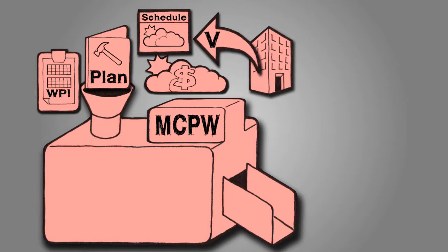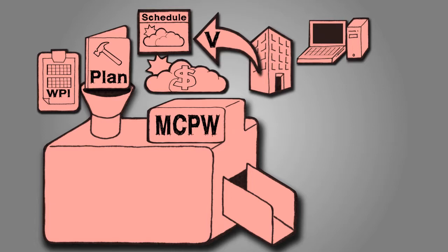Enterprise environmental factors and organizational process assets are things like federal regulations and quality standards that are all external factors that can have a significant impact on the monitoring and controlling processes. If during the execution of a construction project, the Environmental Protection Agency creates a regulation that designates the land being used as an environmentally sensitive area, this enterprise environmental factor can have a huge impact on the scope and even the viability of the project.